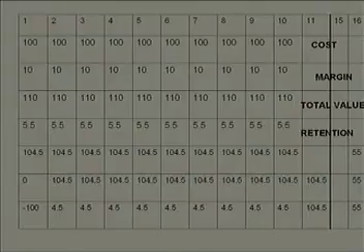So, cost plus margin becomes my gross bill or total value. So, you will find that the gross bill value becomes 110 for month 1, 110 for month 2, 110 for month 3 and so on up till month 10. So, these figures get repeated. This is just to simplify our calculation. I have assumed that I am incurring uniform cost throughout the project, I am getting a uniform margin throughout the project and hence my bill value is going to be same throughout the project.